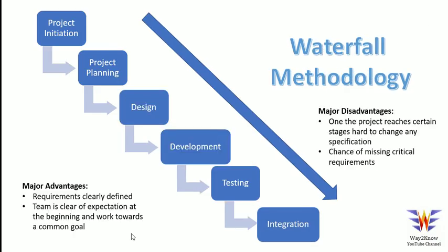So now in this case, it is very important that the documentation is maintained, and for each and every step the documentation is a deliverable and there is a sign off. So that is one of the important things in waterfall methodology.